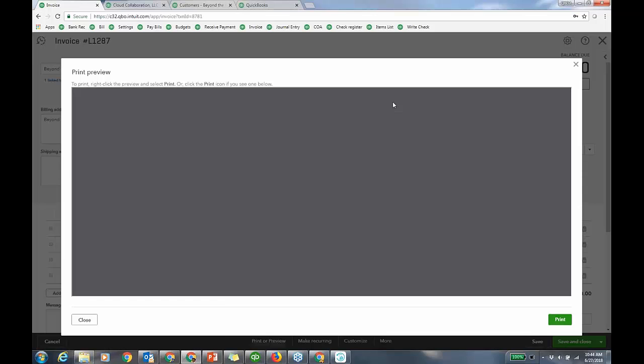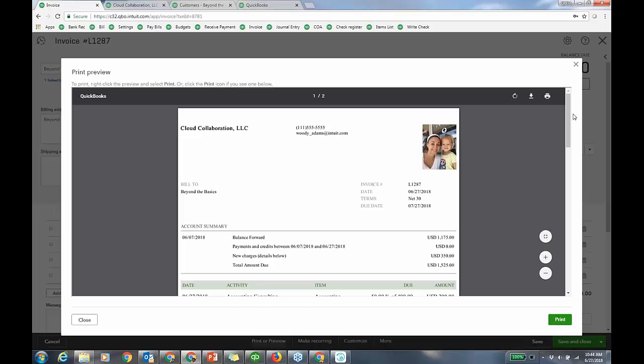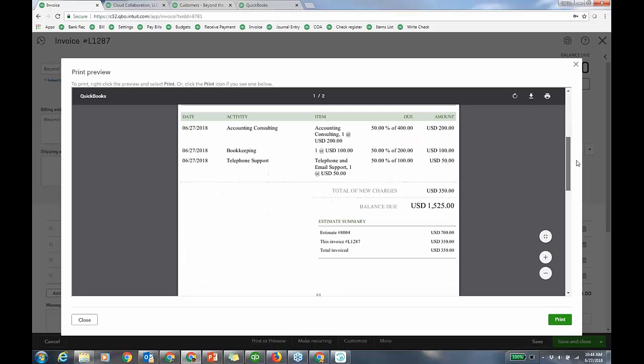This is for the invoice going to my customer that's accepted the work I'm going to do for them. And I've already invoiced 50% of the job. So what are they going to see, right? Down below they see the estimate summary. So total invoice so far, that means to me I have $350.